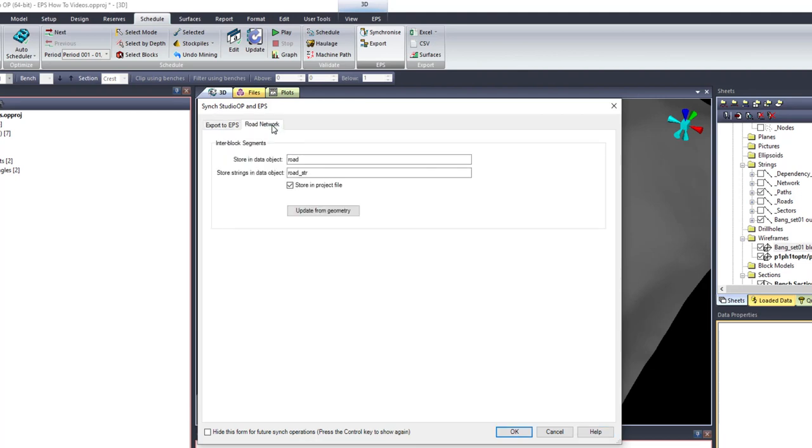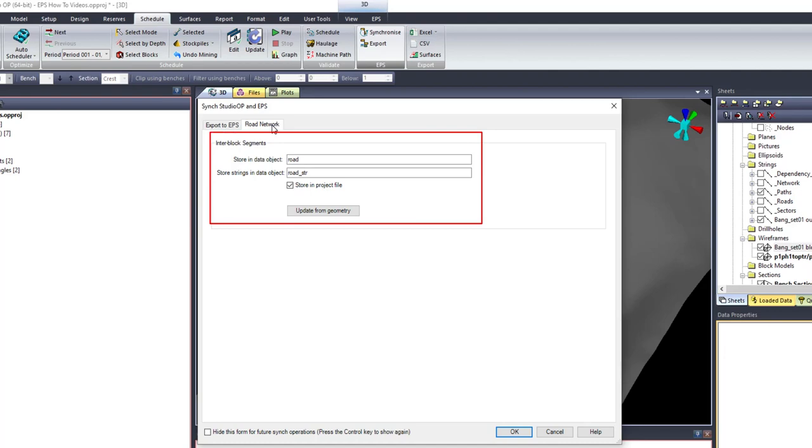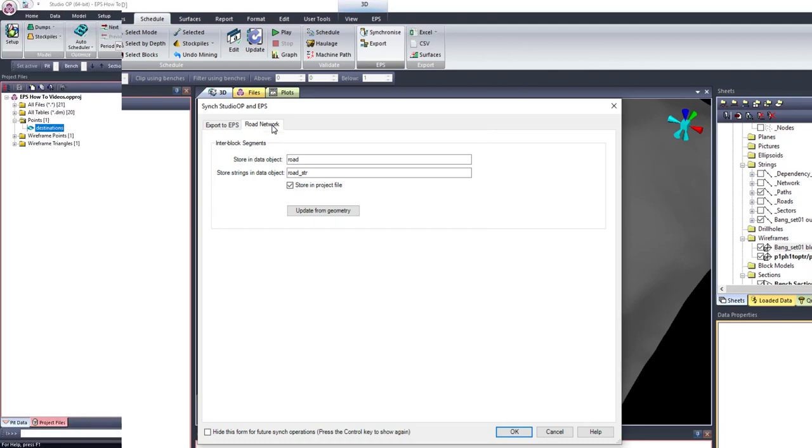The Road Network tab of the synchronized form allows you to complete the whole edge network in Studio OP for use in EPS and store it in data tables in the Studio OP project files.